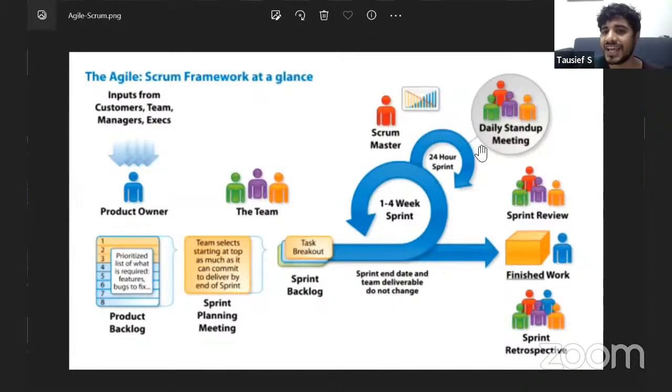And let's say if there are any kind of blockers anywhere, the team is not able to finish the work on time, or they are struggling with anything, or the plan of 2 weeks doesn't look achievable, that is where the Scrum Master role comes in the picture, where these guys work very aggressively with the team to make sure that all these blockers are solved and the team progresses on the initial commitment which was done.